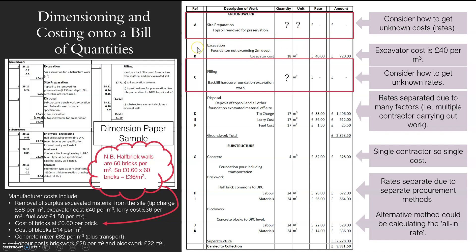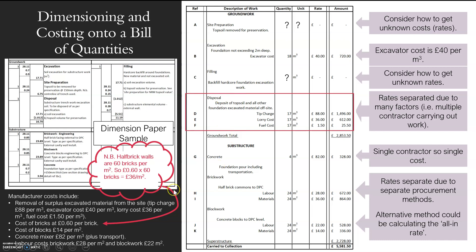I'm going to move on and give you examples that I do know. For excavation, I know my excavator cost is £40 per meter cubed — I found that out from the manufacturer. I also know I've got 18 meters cubed of soil excavation, because I've multiplied it out: 18 meters cubed times £40 gives £720. Then you move on and do the same for all the others.